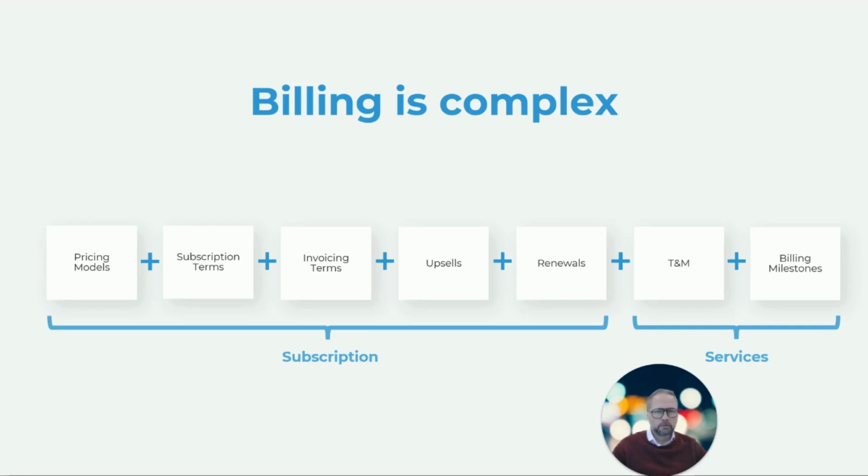And then, of course, you still are dealing with service billing. And so we have projects that might be time and material based, where you have a set rate or a rate specified by a contract, number of hours, and basically collecting those hours each month and getting an invoice out the door. And of course, you've also got models that are more milestone based.